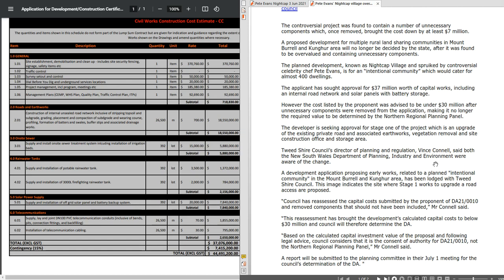The interesting thing I found was the last two paragraphs, because clearly Vince Connell from the Tweed Shire Council has talked to the Daily Telegraph, the Tweed Telegraph, and spoken about the development and how it will now be reverting back to council to be the final consent authority on that development application. And down here they say that based on the calculated capital investment value of the proposal and following legal advice, council considers that it is the consent of authority for DA 21-0010 and not the Northern Regional Planning Panel. A report will be submitted to the planning committee in their July 1 meeting for the council's determination of the DA.